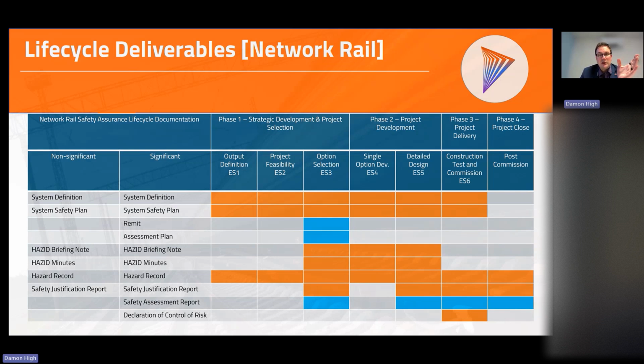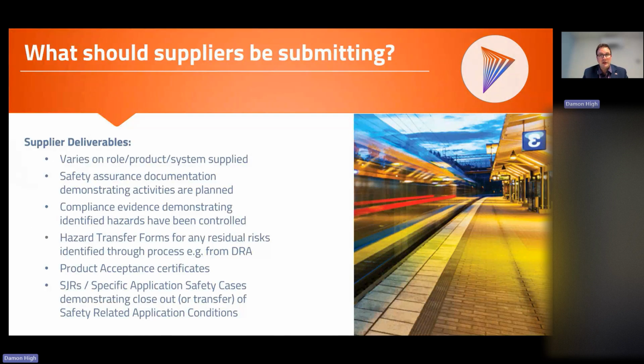But as we've talked about previously, there's a lot of information that would need to be fed into that from the rest of the project. What that looks like massively differs depending on the types of projects we're working on, which is why it's really good to capture that in the plan so that we're not left guessing as we go through the process. It could be that some of the suppliers are just purely delivering their day-to-day engineering assurance deliverables, like their design drawings and, from a UK point of view, their Form 5s, Form Bs and Form Es, that they're producing at detailed design, at commissioning, at handover. It could be that they just need to produce that information because that's what we need to demonstrate compliance against our safety requirements.